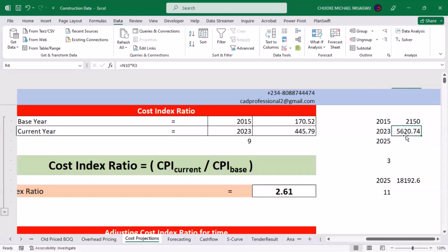The right approach is to always leverage the information that is available from the authorities that have been mandated to produce such information. And one of such that we talked about this evening is the NBS. When you get to the NBS, you should be able to see the Consumer Price Index. I tried to show us the kind of information that you may have there. There are some that might not be relevant to what you're talking about. You don't have to go crawling over it. Just pick the right one that you need.